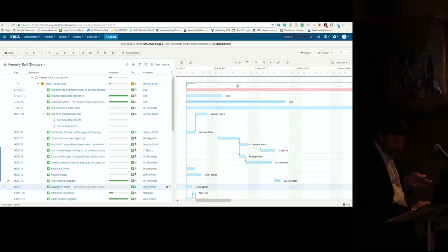And so I have it selected. I'm going to go up here and convert it into a milestone. And I'm going to say that when we complete this task right here, we will have accomplished warp drive. And that'll be the milestone that all of these tasks lead to, and we can then claim success on a milestone within the overall progress of the project.